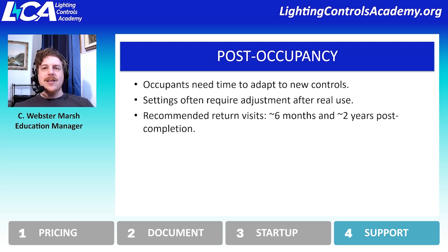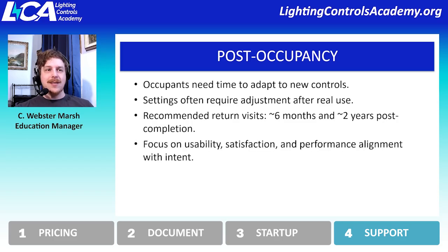But then about 2 years afterwards as well, because at that point enough time has passed where people have really grown comfortable with the system, they understand it, and they really can now say, oh, I really wish this could do X, or you know what, we thought we wanted this but really don't want this, so can we eliminate this? Having that more thorough conversation at about the 2-year mark really gives the project a high success rate, because the end users are going to feel more comfortable with the system and it really does meet their needs rather than just cookie-cutter needs.